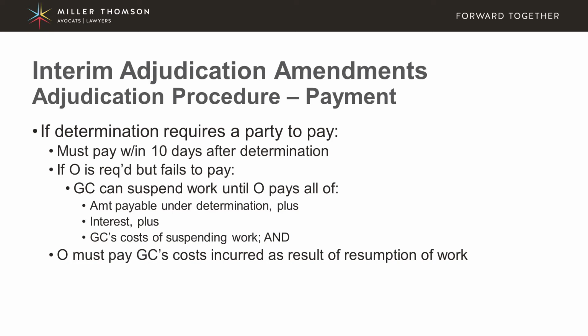So as you'll note, it's very important that once a determination is issued, it must be paid within that 10-day period, because otherwise the general contractor now has a statutory right to walk off the job. Currently, the way things are is that often general contractors would just walk off the job, but it's not always a good idea for them to do so.